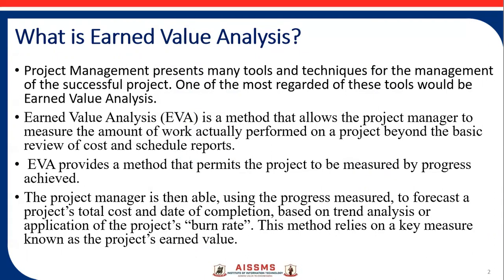EVA provides a method that permits the project to be measured by progress achieved. The project manager is then able, using the progress measure, to forecast a project's total cost and date of completion based on trend analysis or applications of the project's earned value. This method relies on a key measure known as the project's earned value.